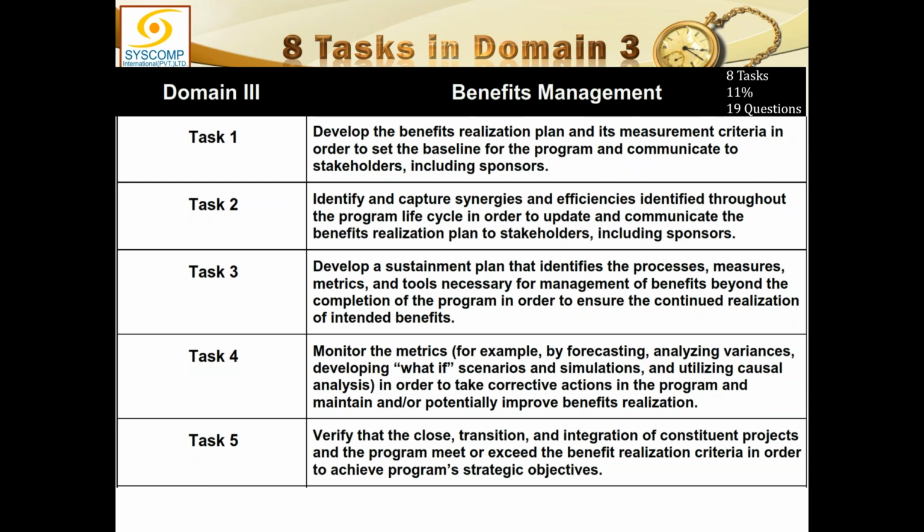So every project will realize some benefits at some stage, even after the project is closed down. And the program manager, because the program manager is the sponsor of all the projects, takes on the responsibility of realizing those benefits. But if it was not under a program, then whoever was the sponsor of this project would have been responsible for realizing that benefit.